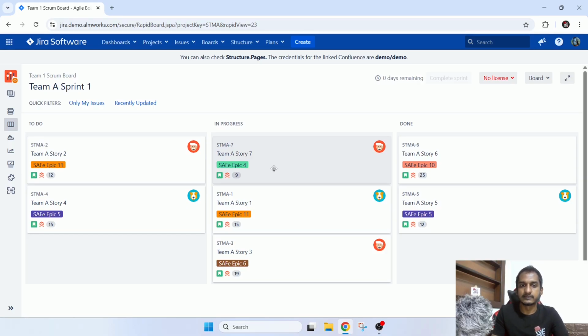And in such cases, if there is still active work to be done, then you need to move this particular ticket to the next sprint. Here, you don't need to change anything in the ticket. You can click on complete sprint. Then it will show a dialog box. It will ask what they should do with the remaining incomplete tickets. So then there will be a drop down.